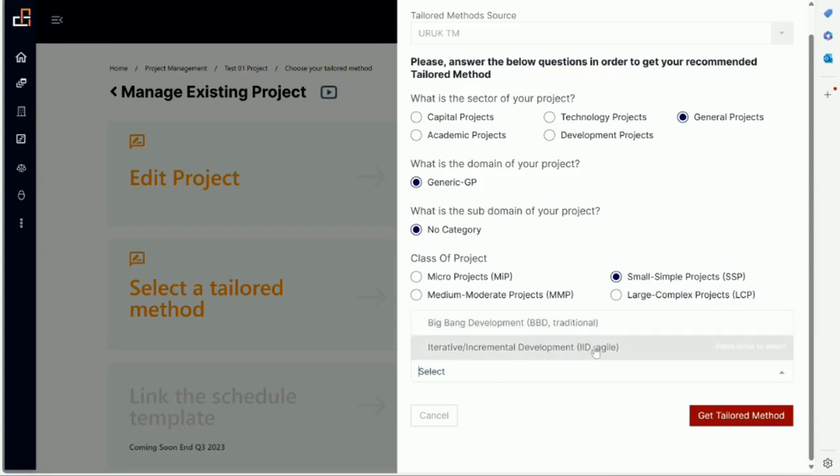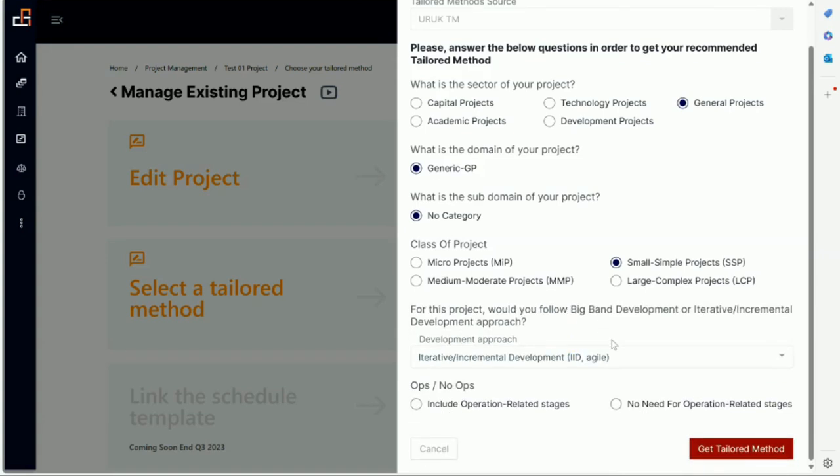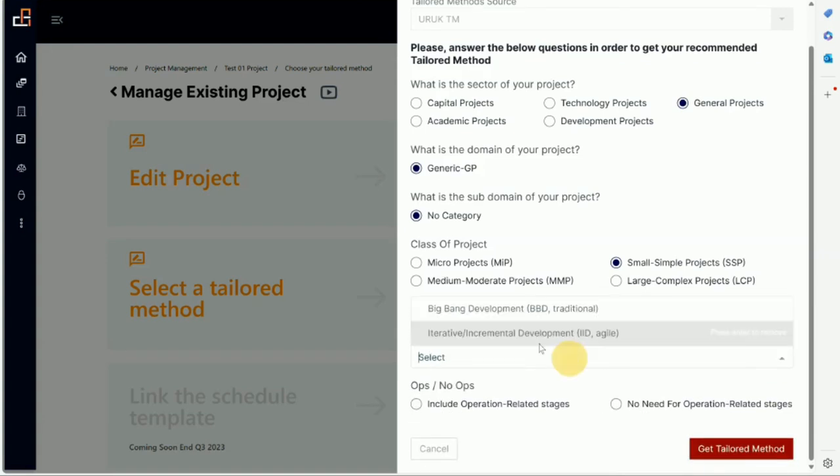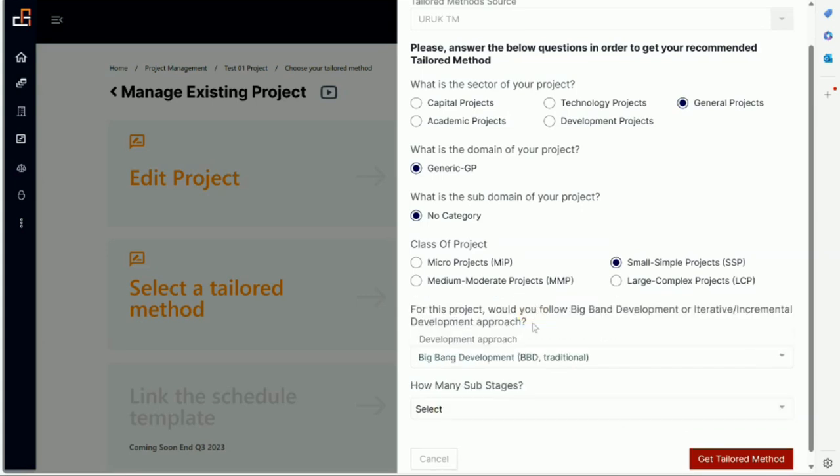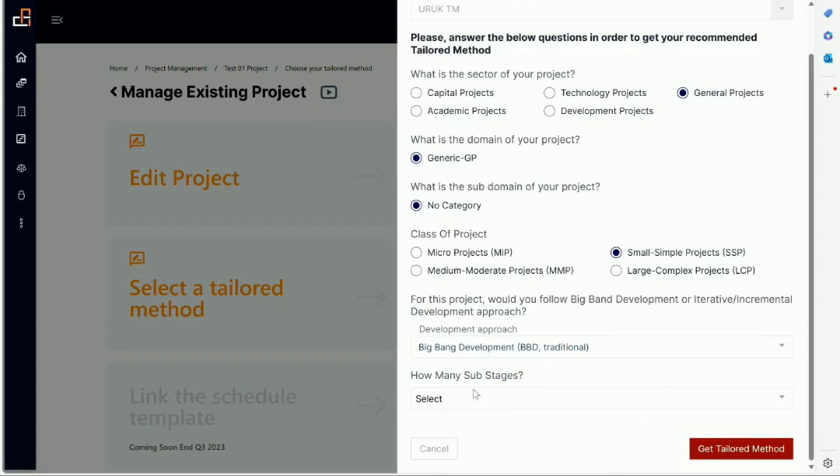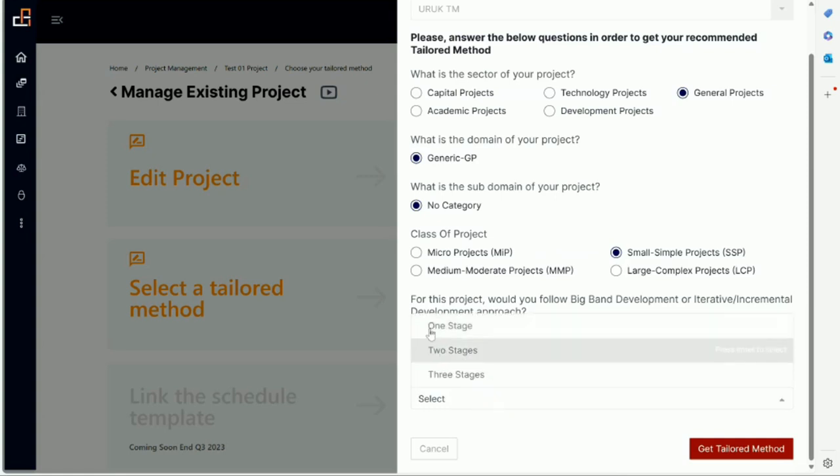That's what we have: we have big bang development and we have agile development or iterative incremental. If you choose iterative incremental then you will move on to the next question. However, if you choose traditional or big bang, notice there's another box that comes up. It says how many sub stages, and maybe we need to clarify here we mean sub stages in the implementation stage when you go to execution. Do you want to have one stage like one EPC contract, one design-build contract, or you want to separate design from build, or you want to separate engineering from procurement from construction? So you have the choices of having one stage, two stage, or three stages.